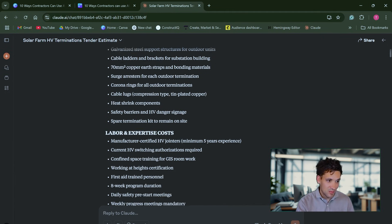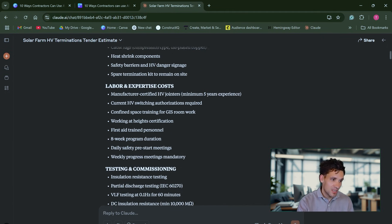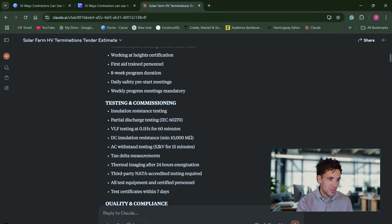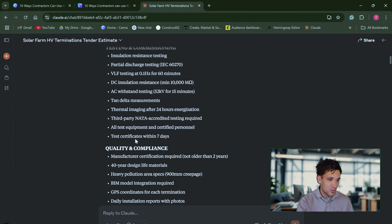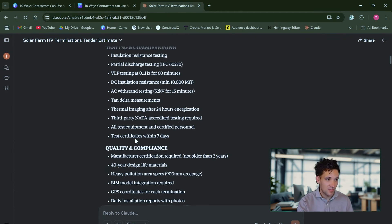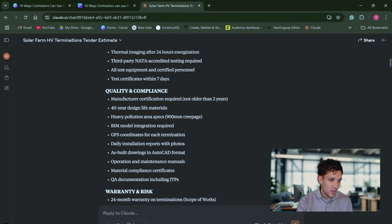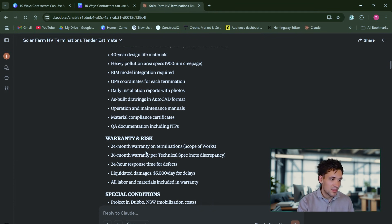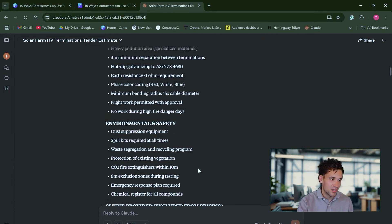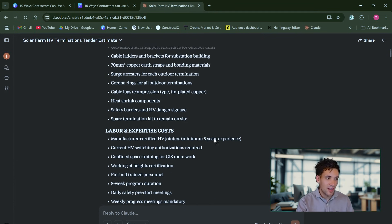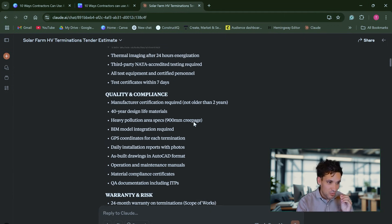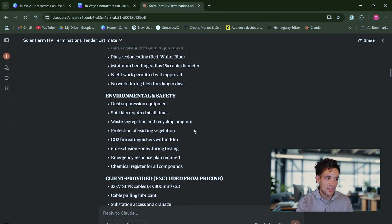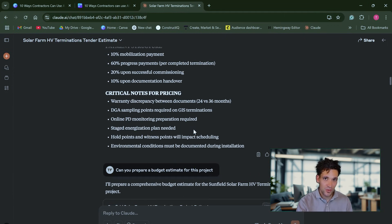It summarized the supply requirements, labor and expertise costs, testing and commissioning. We have to do insulation resistance testing, partial discharge testing, VLF testing, quality and compliance. We need a 40-year design life, a 24-month warranty. So rather than having to go through all these documents manually, it's produced a concise summary that we can refer to.